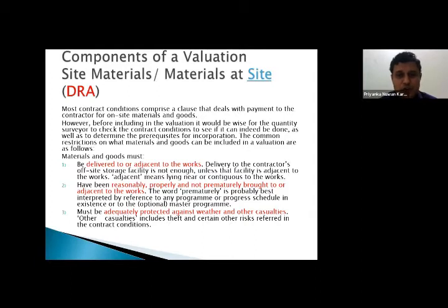Number two, they have been reasonably, properly, and not prematurely brought to or adjacent to the works. Reasonably, properly, and not prematurely. Now, for example, if you are doing the foundation at this juncture, you should not take the finishing items to the site while you are doing the foundation, because they may be susceptible to damage. Who knows, there may be a natural calamity. So it is not a sensible way of considering materials at site. This is what I wanted to tell you. So it has to be reasonably, properly, and not prematurely brought to or adjacent to the works. Okay, so that is number two.